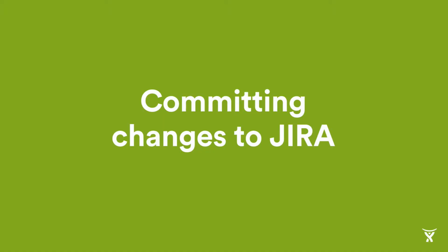Up until now, we've played through different planning options here in Portfolio, but all these changes have not been applied back to the issues in JIRA. This has a couple of advantages. You can try out different options without distracting your team, and while you're playing around, no change notifications are triggered until your plan is actually ready. And also, this makes it very easy to revert your changes if you're not happy with the resulting plan.